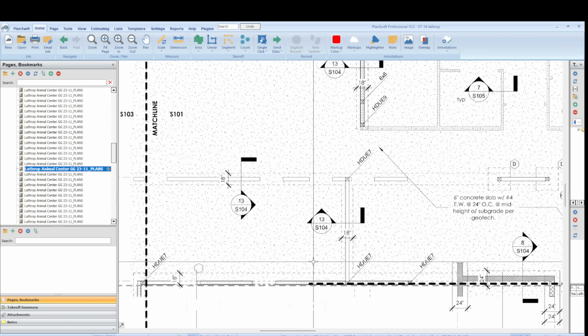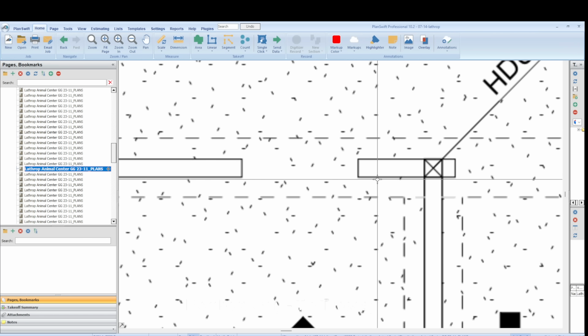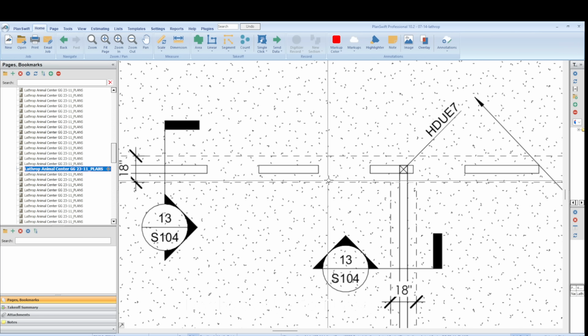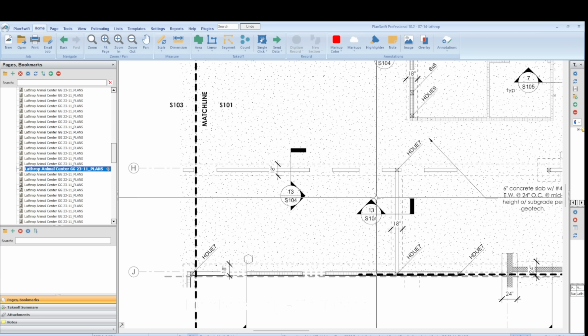And this is the foundation, the bottom of the building, so any breaks in that, you're going to reference the bottom of the building. What kind of break do we have? Well, we have the threshold for the doors. But when we're measuring how many linear feet of foundation, we're just going to go through that. We're not going to eliminate any of the gaps there. So we're going to go from this end all the way to that one.